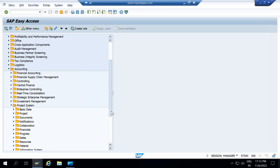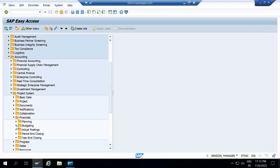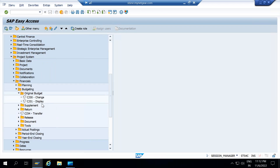Let's open that folder again — go to accounting, go to project system, go to budgets, go to financials, and now go to budgeting. Go to original budget. This is my transaction showing in front of the description: change or display. CJ30 is to change budget — if you want to plan your original budget, you need to execute transaction CJ30. If you want to display the planned budget, you execute transaction CJ31. The same transaction you can execute through Fiori app also.